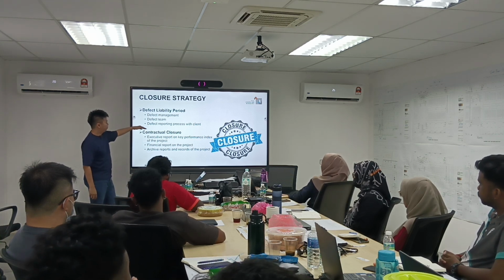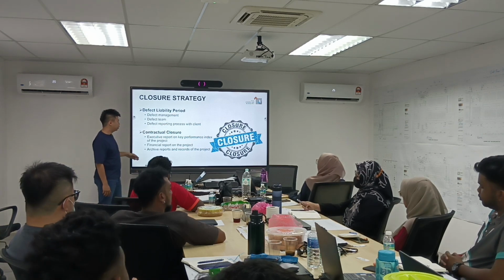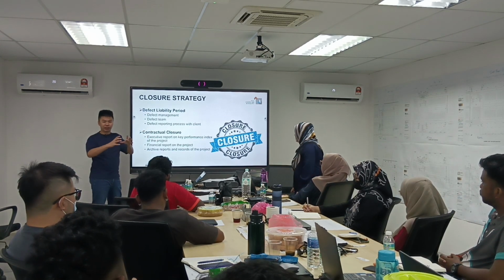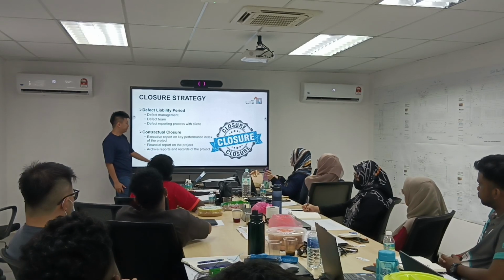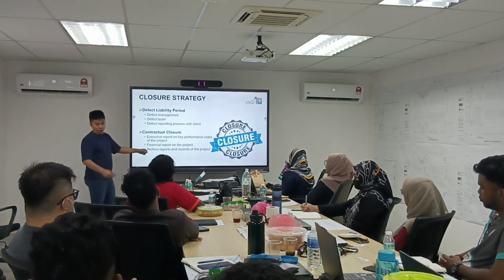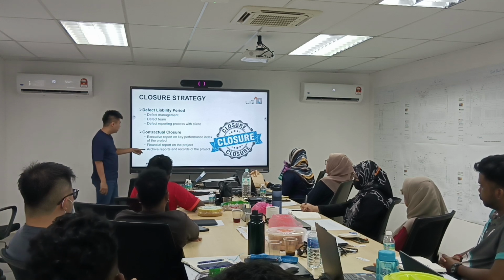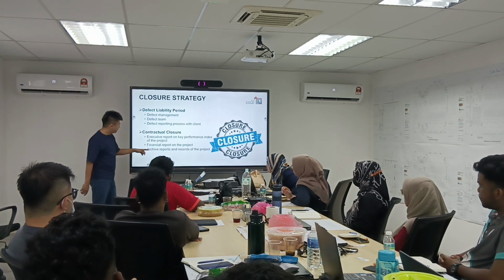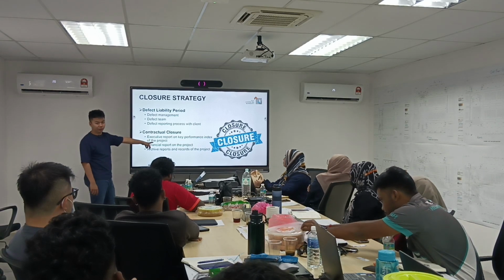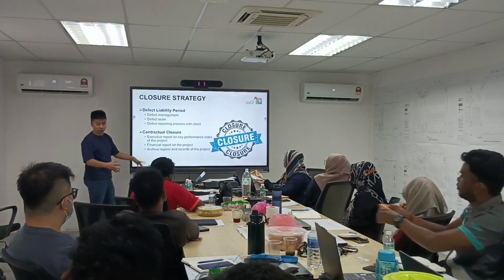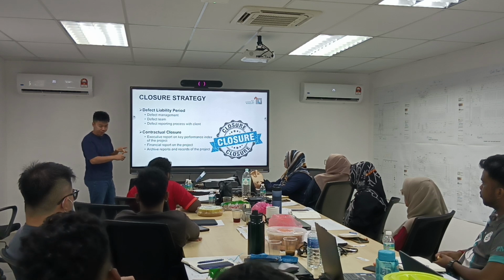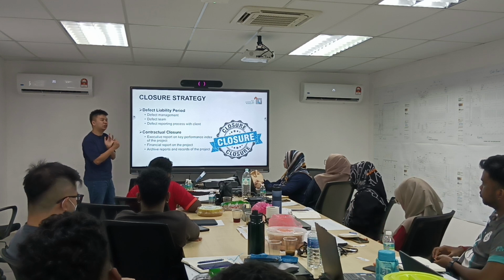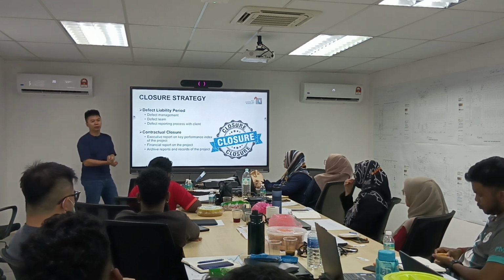Okay? So finally, after you issue the CMGD, this is what you officially end one project. We call it the contractual closure. Okay? After you issue the CMGDs, of course, during the DRP, there might be some VOs ongoing as well. So after all those things done, then you might want to sit down with the whole team to talk about the performance index of the projects. Are we running the project efficiently with correct numbers of headcount, correct numbers of total and size, and correct timing? And actually, what is the major issues that we face in the project? And why this major issue happened?